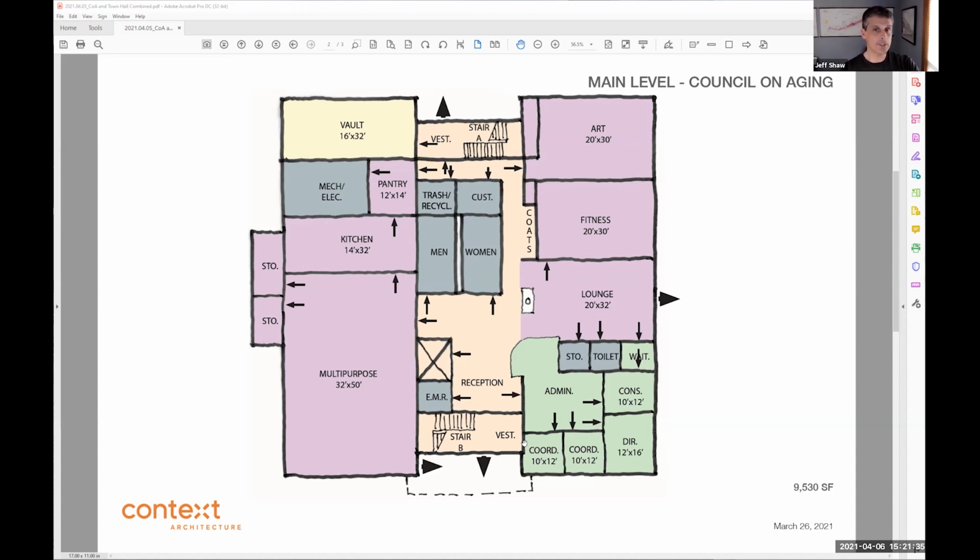So if the site was equal to what we have now, a fairly minimal amount of land, not an extensive amount of site work, replicating wetlands or really dealing with a lot of troubled issues, then it would be closer, but you're probably going to be adding costs if you get into a more complicated site.